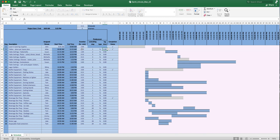Task two runs for 45 minutes, putting you at 11:15. The next task depends on task two being complete, so it starts exactly at 11:15 with no additional lag. It runs for one hour, finishing at 12:15. You can see this graphically — the bar starts right when the previous one ends, confirming the calculated start time.